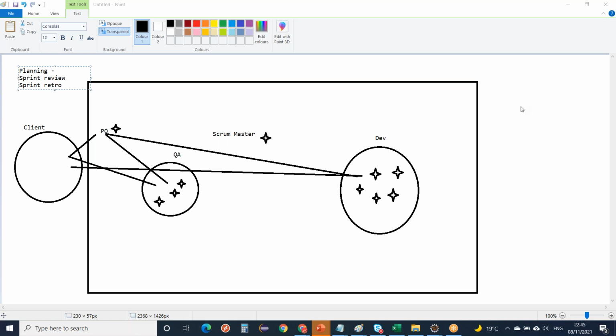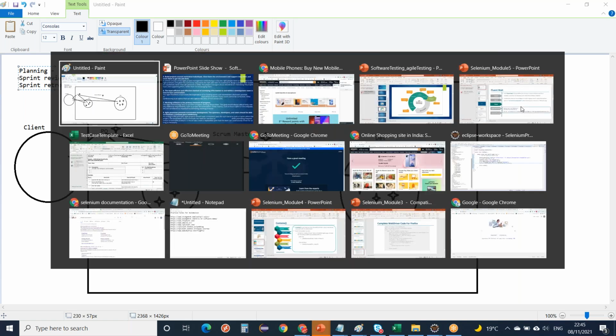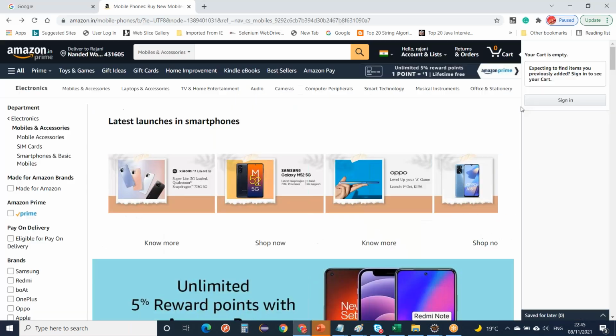And then what will be done in this is, from your product backlog list. What does product backlog list mean? The entire feature list of your product is nothing but a backlog. From that list you will be taking the user stories, and then decide which user stories we will be working on, and then estimate the story points.